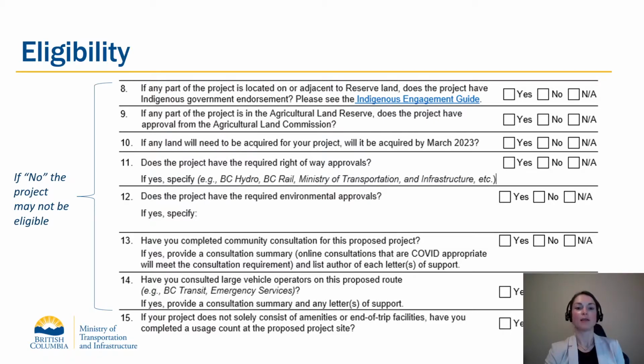It isn't uncommon for applications to not include some key eligibility requirements such as permits, Indigenous authorization for on-reserve land, or property acquisition. In these cases, applications are deemed ineligible, but can be reconsidered the following year, providing the necessary documents are included.